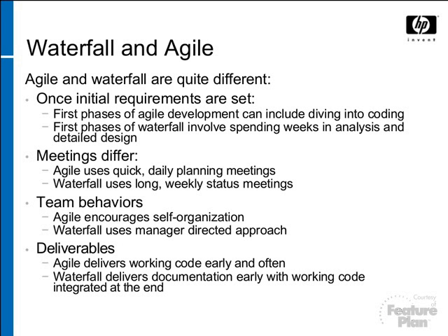They don't do the analysis and design and detailed design on every feature that's planned for the release. And we do that because we were finding that certain requirements end up dropping out of the release, and so you've wasted that time doing that detailed analysis of how those requirements should work, and they may never get implemented. So instead of using developers' time and product managers' time designing those, and UI's time and things, we just design the things that will go into the first iteration. So they can truly dive straight into code, as opposed to the first phases of a standard waterfall process, where they spend weeks in analysis and come up with detailed design specs.